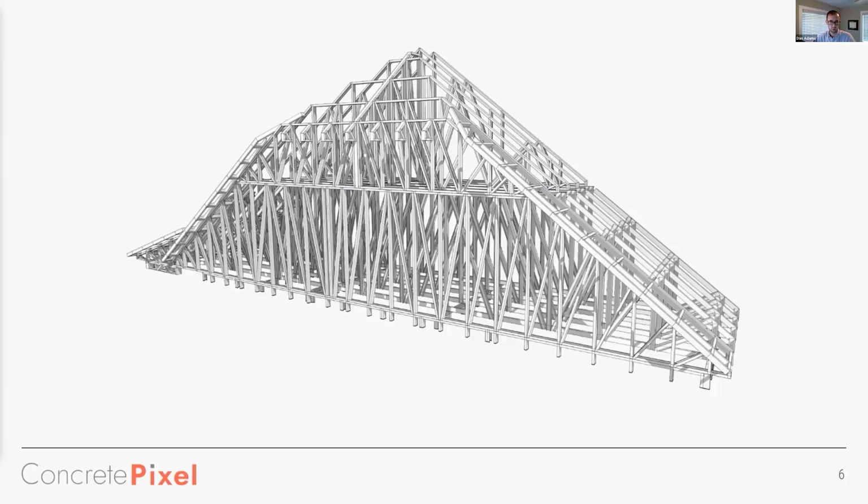Some truss design tools inside of Revit, things like MWF Truss Designer, can give real-time feedback on configurations. So quantities can be extracted and used for estimating and ordering raw materials. Mechanical clearances can be incorporated into truss designs and provide downstream coordination benefits. There's also direct feedback on load paths and how it's going to impact wall panels.